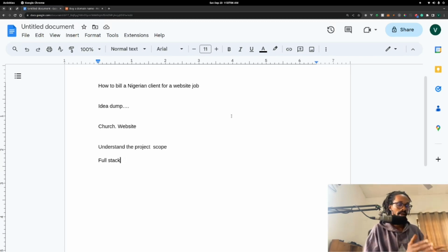Now, the next milestone, for instance, would be the user registration system and then a basic dashboard containing the information that the church members should have. That's a nice milestone. Next one can be the financial part of it, which is accepting donations, maybe integrating Paystack, Flutterwave, etc. Accepting donations, accepting tithes, and those kinds of things. Having done this, each time you meet a milestone, it is subjected to review, and then as soon as the client is happy with it, you move to the next phase, and then you go to uploading the project.